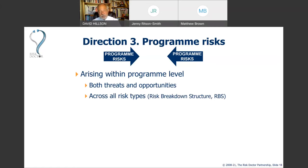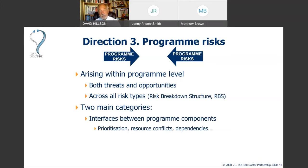Programme risks span all types as seen in a risk breakdown structure: management risks, commercial risks, technical risks, external risks — the full range can affect us at programme level. What we're particularly looking for are risks that arise from interfaces between components: priorities may change unexpectedly, common resources shared between components may cause uncertainty in handoffs, and dependencies and constraints between components can create ripple effects through the programme.